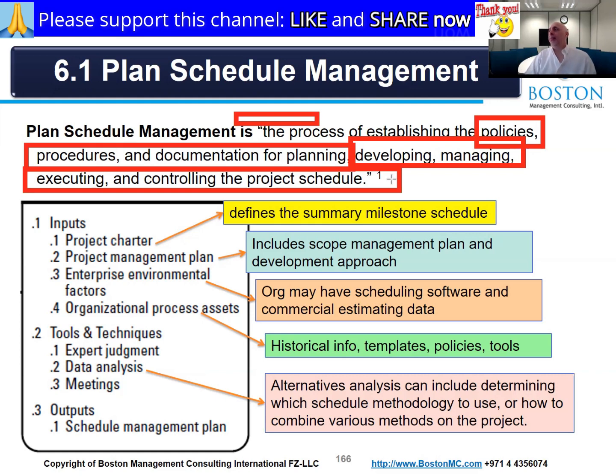All right, but Excel, unless you're doing a very, very small project, is a bit tough to actually manage with, because Excel, yes, it can give you a list, you can put durations, but it's really hard to build in dynamic changes. If one activity gets extended, I cannot see the impact on the rest unless I manually go change them, or unless I want to build in macros or something.